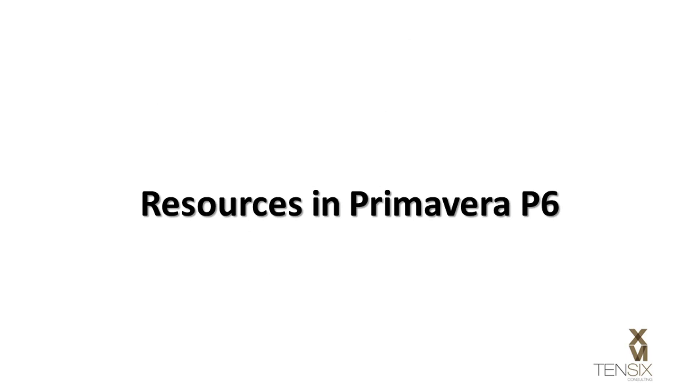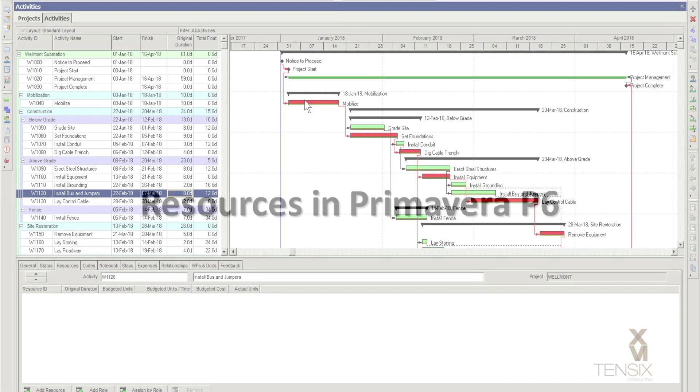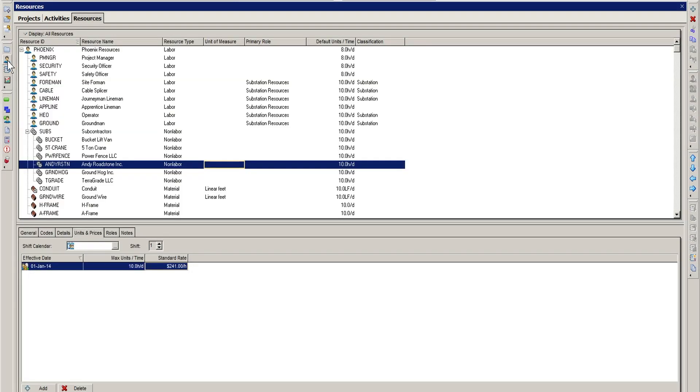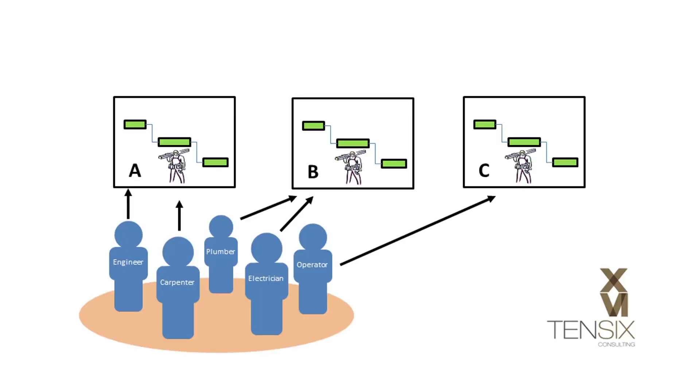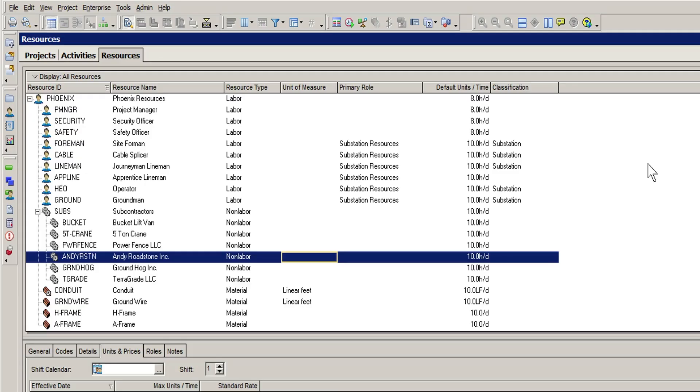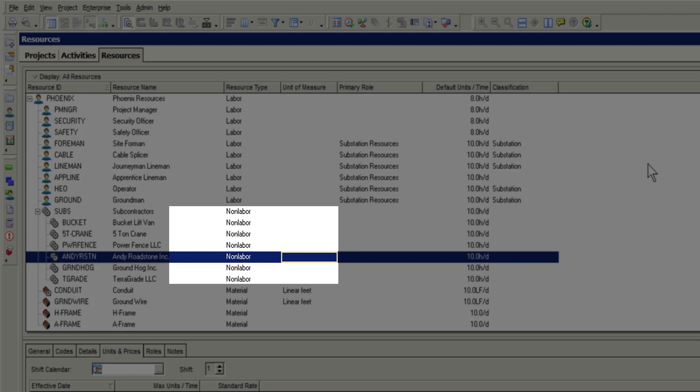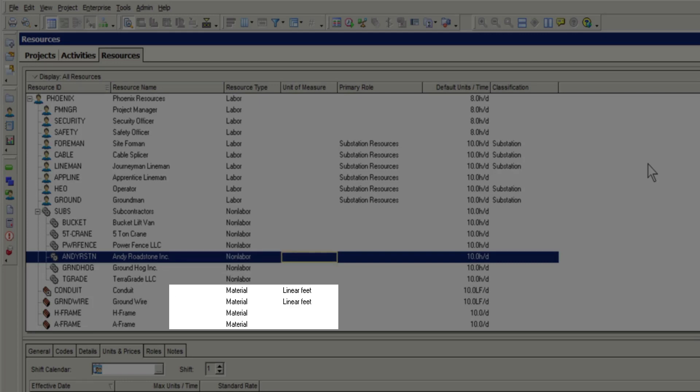Resources in Primavera P6. Let's take a look at resources in the Primavera P6 resources view. In P6, resources are global, meaning they can be used by any project in the system. P6 supports three types of resource: labour, non-labour, and materials.